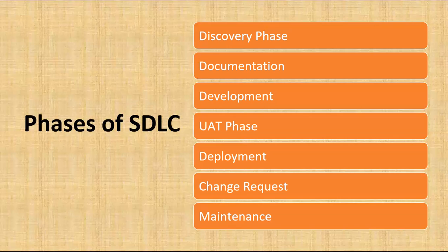In the handover also, you as a BA will prepare user manuals. The user manual is prepared as per the use case, as per the client, as per the customer, as per the company, as per the tool. The user manual is prepared by the business analyst. And the solution architect will also prepare some of the handover documents, in which he showcases the solution, the robot, the technical terms he has developed, and the robot licenses. All these things he will deliver. So this is something we do in the handover documentation.